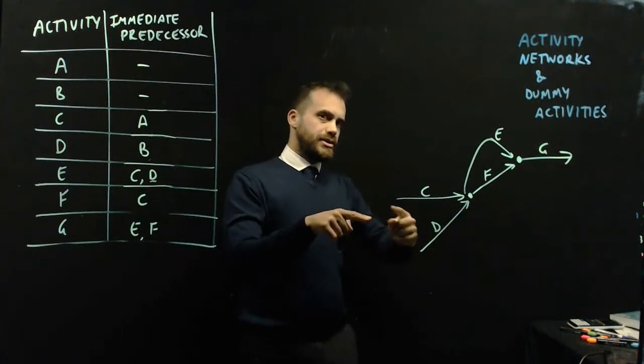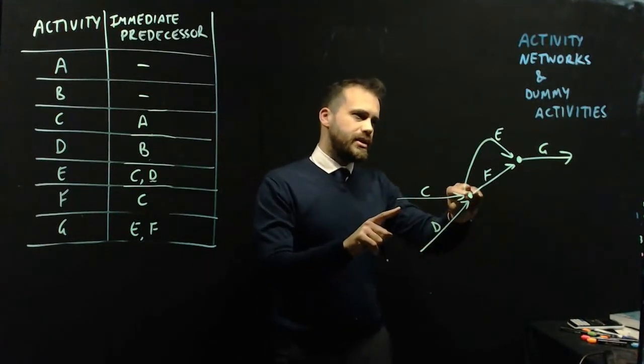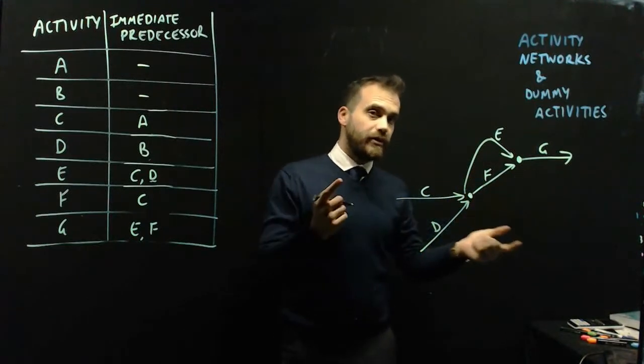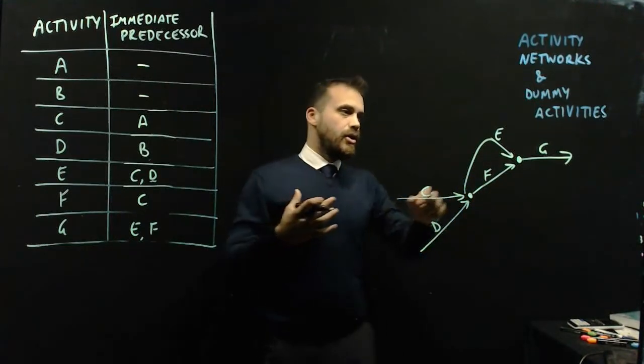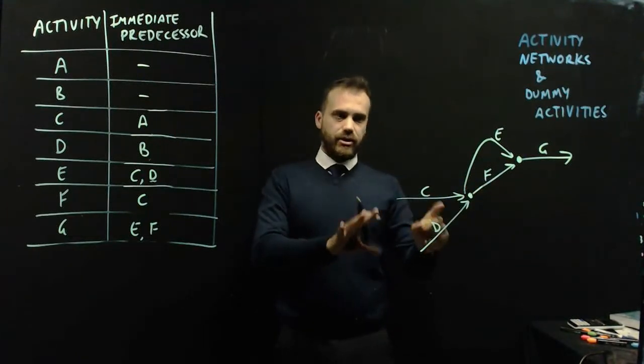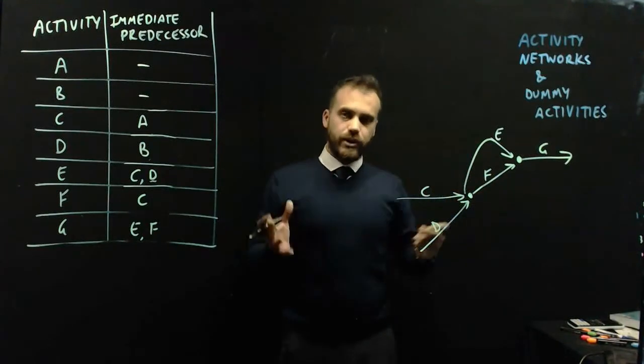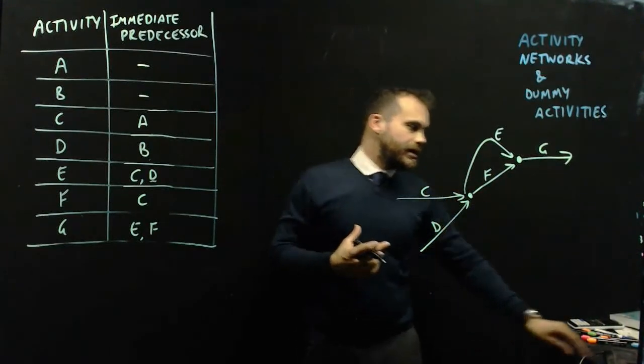Because this picture seems to suggest that D is the immediate predecessor of E and of F. And it's not the immediate predecessor of E and F. It's only the immediate predecessor of E. So what are we going to do? We're going to use something called a dummy activity.